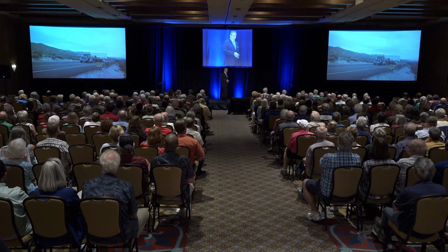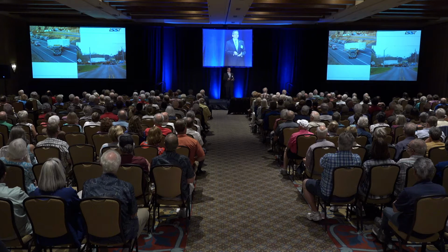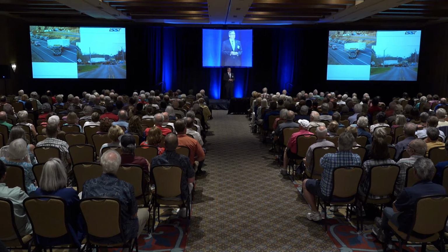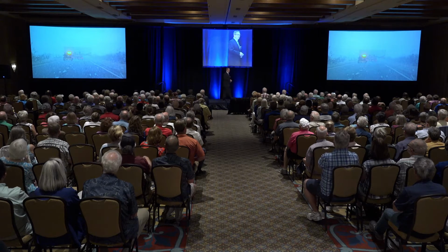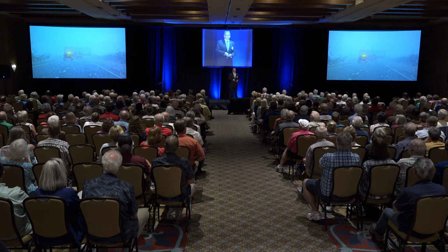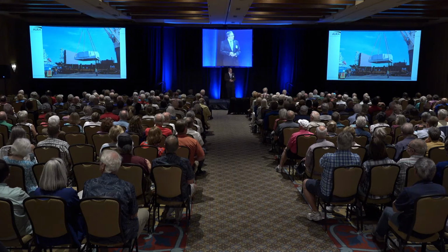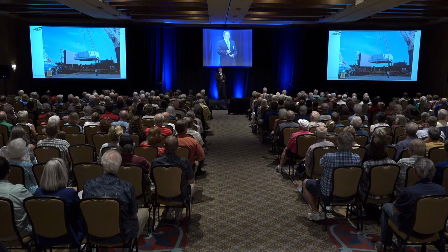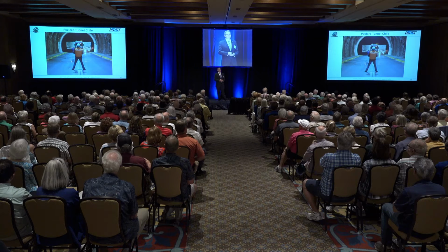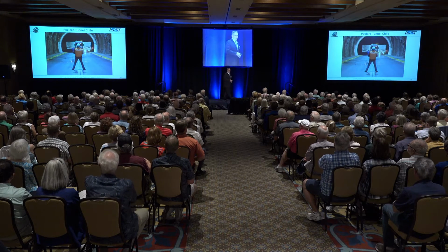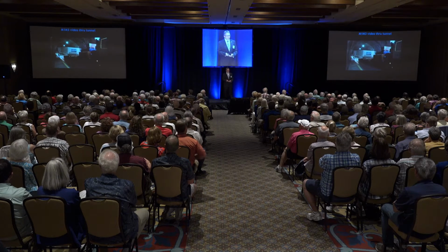And you can see here that it's not just a slow drive to Houston, but it's also particularly longer because you don't get to go in a straight line when you're driving something that big. You do eventually get to the port, but you also don't get to pick the weather. And between here and Texas, you can confront almost anything. You do eventually get to a port in Houston, and things go a lot smoother once you get on a ship, but if you're familiar with what it takes to go from the port in Chile to our mountaintop, we also do have to go through one particular tunnel. So I'm happy to report that it did fit, and it worked out smoothly, and the mirror made it fine to the summit.